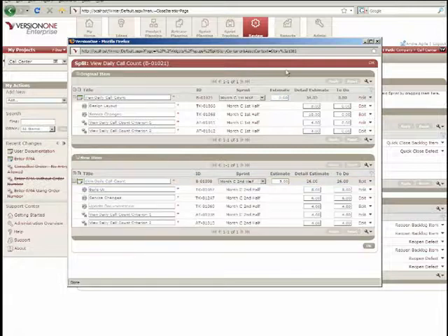And the reason for that is because in Agile, we do not take credit for work we do not finish. Now, finish means that work is done, or done-done, and the team determines what done is based on that acceptance criteria, the test. So if we didn't finish the story, we don't get credit. That is the gist of it. In Version One, you do have the option to edit those fields because there are sometimes that you understand exactly why you didn't finish the story, like half the team came down with the flu, but you typically would not take credit for that estimate until you achieve done.